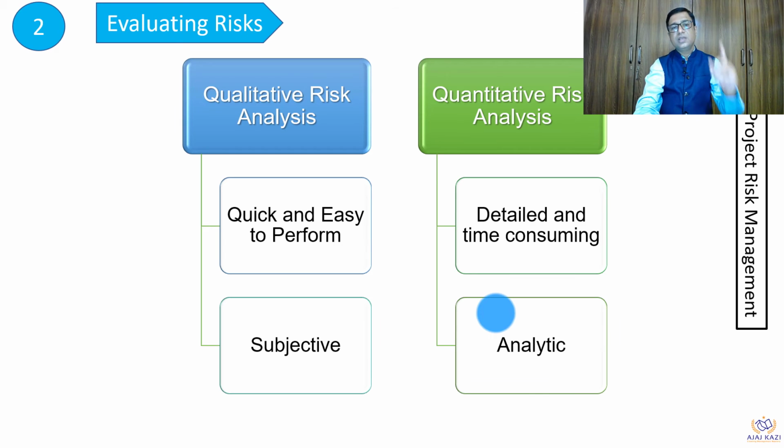As I said, evaluating risk will have two types of analysis. One is qualitative risk analysis, another is quantitative risk analysis. Qualitative risk analysis is done at the beginning because we don't have many details of the project available.